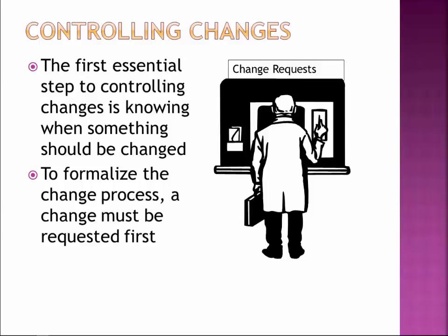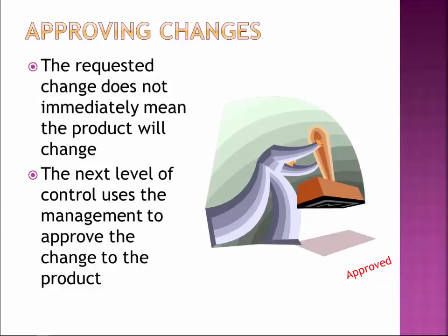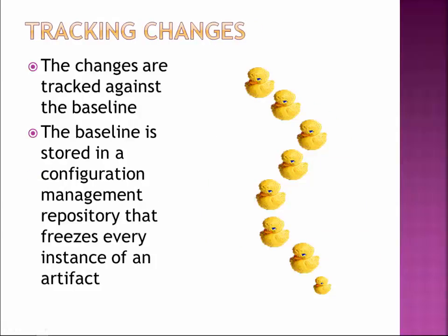We don't just start making them. We ask, how is this going to impact it? And then we approve that change. So if the change request is deemed to be something valuable in relation to the cost or essential in relation to the cost, then it's approved. Otherwise, we may defer the change, we might decline the change. No, we're not going to do that. That's part of your project management process, particularly around requirements changes.